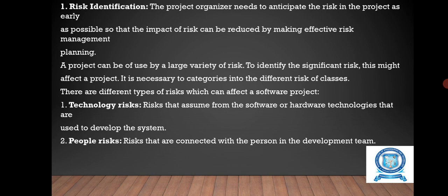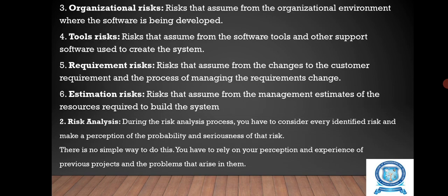Technology risk that arises from the software or hardware technologies that are used to develop the system. People risk, the risks that are connected with the people in the development team. Organizational risk means the risks that arise from the organizational environment where the software is being developed. Tools risk that arises from the software tools and other support software used to create the system. Requirement risk that arises from the changes to the customer requirements and the process of managing the requirements change. Estimation risk that arises from the management estimates of the resources required to build the system.